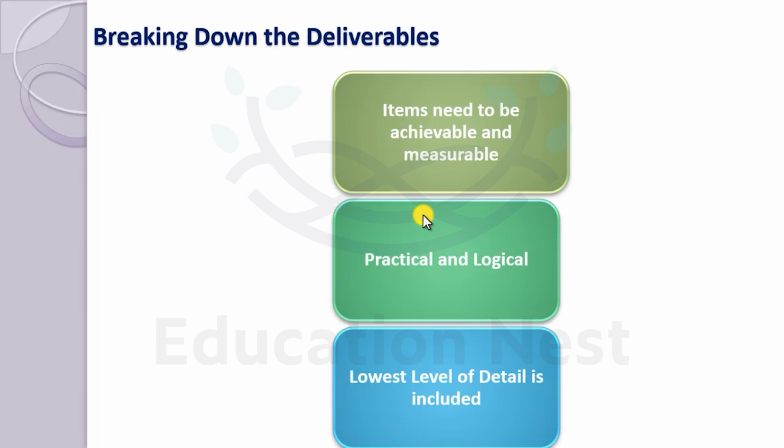Again, as I mentioned, all these things need a thorough analysis, because as an expert project manager, when a project comes to you, you need to know whether it is from scratch or not, since many times we will suggest something but the client restrains from it due to budget issues. So all these things come into the picture. At the initial stage, whenever there is so much unpredictability, it is better not to give low-level details. But as the project goes, it's very important to break down into details and track them. That's how breaking down into deliverables comes in.